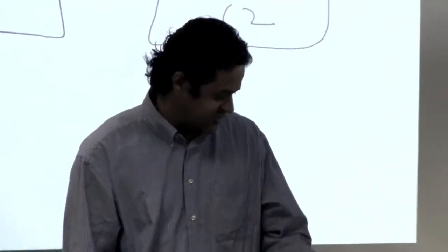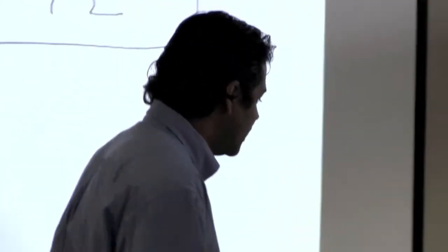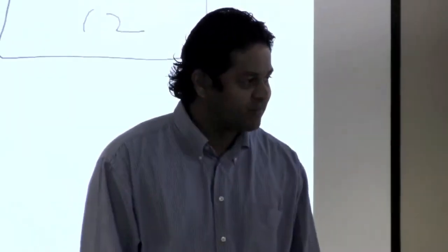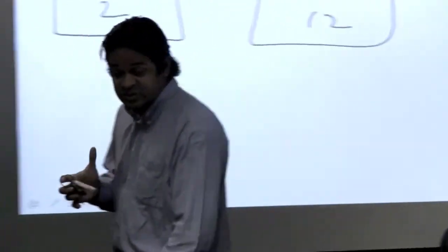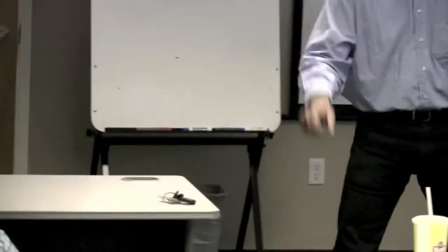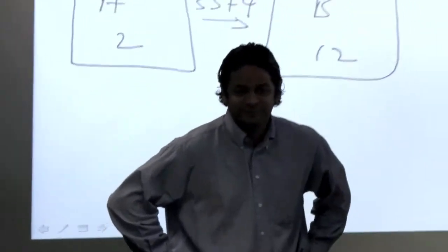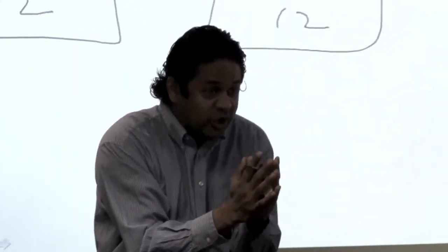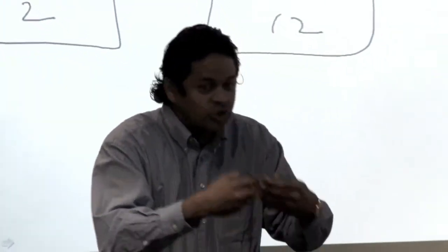There's another question I'm going to ask you. Your customer says it should be this. Your expert with 20 years experience says it should be this. Now what do you do? Don't go with either of them. Bring these two together, let them talk it out, and whatever they decide on, you do that.